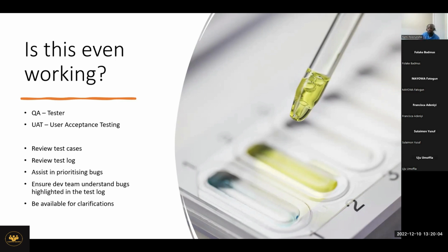Remember, we've not even launched it, so it's not available to all of our employees within Career Haven as our organization. But a few users that we have highlighted, maybe 2 people from HR, 3 people from within the company, 1 person who is a member of the approval roles. Again, we can treat UAT as a webinar on its own, right? Because you don't want to have 500 people testing. How are you going to collect the test results? How are you going to analyze them?